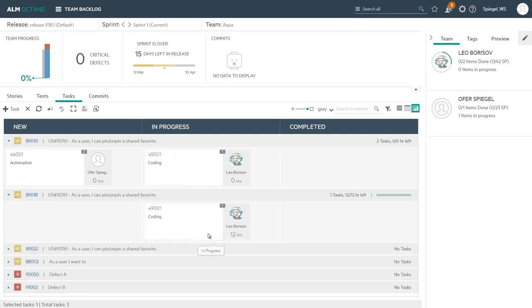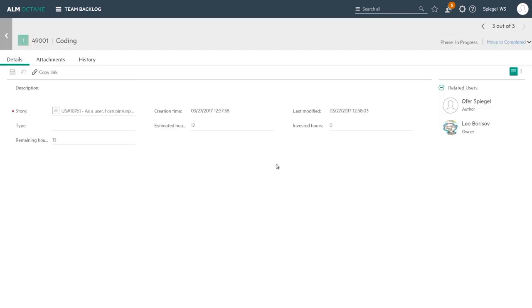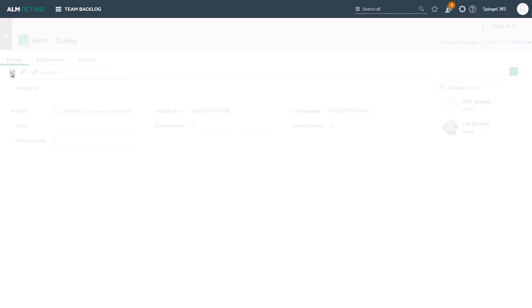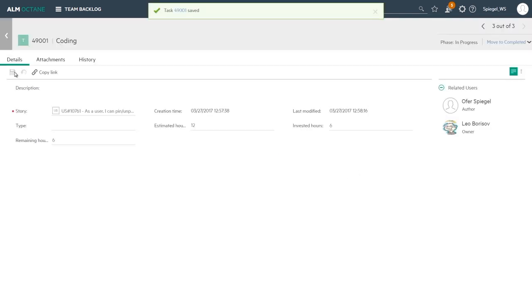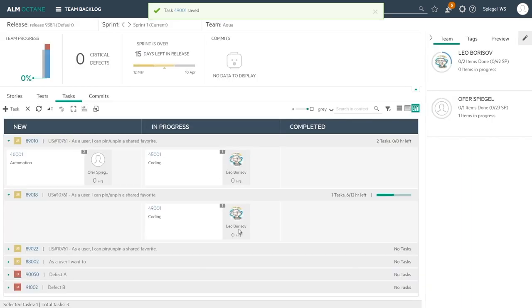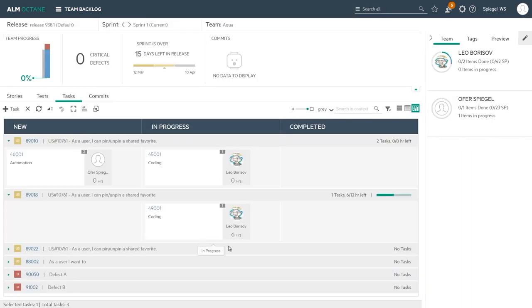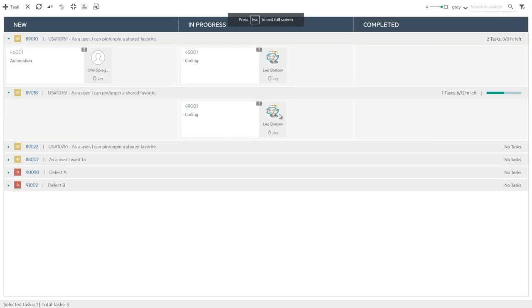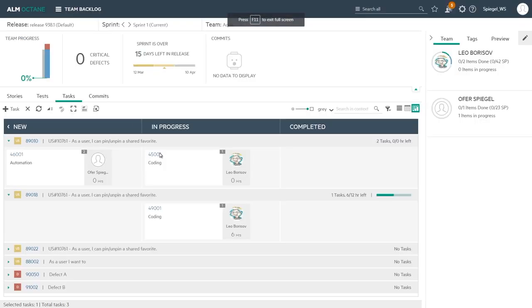And if needed to also update the hours that were invested, for example six hours were invested out of those twelve. So I can save it and get the remaining hours are six that still need to be invested further. So that would be the work when we are using the task board, more or less related to the scrum style of working.